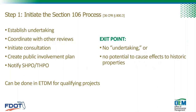In Step 1 we initiate the process by establishing the undertaking, identifying consulting parties, coordinating with other reviews, planning to involve the public, and initiating consultation with DHR. If the project qualifies for ETDM screening, Step 1 can all be done within ETDM. If you don't have a qualifying undertaking or it's determined that the undertaking has no potential to cause effects to historic properties, you record that finding in your project file and you're done — there's no need to complete the other steps.